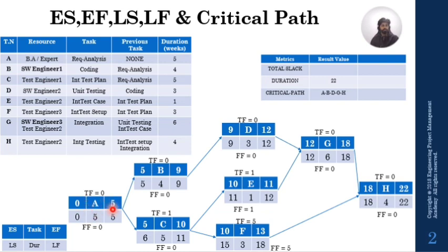So let's say we have requirement analysis happening here, and then coding, and parallelly somebody is writing integration test plans. You see, I have plotted the engineer and the activity, and each of these blocks represents the engineer who's going to do the activity. Next, somebody is doing the unit testing, and along with that, test engineer 2 and test engineer 3 are making the initial integration test cases and then the integration test setup, based off which we are performing integration and finally completing with the integration testing.